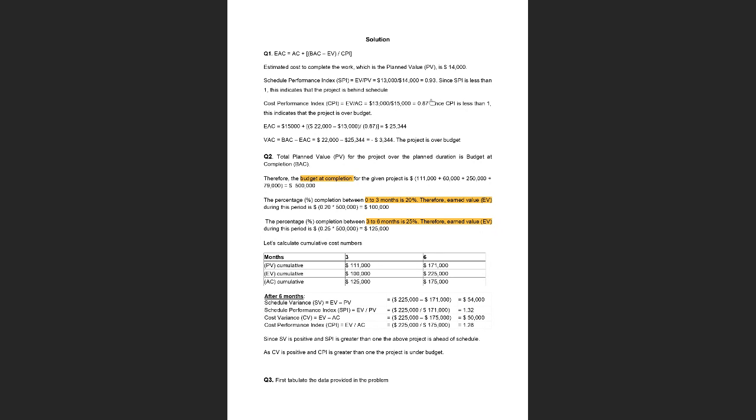All right. I still don't get the value of EAC. Okay, Emiliano. So for EAC, these are the values that you need. So you know what the actual cost is? I'm getting EAC as 23571. Can you tell me what your CPI value is? 0.933. I think that's where your problem is. CPI should be 0.8666 or 0.87.